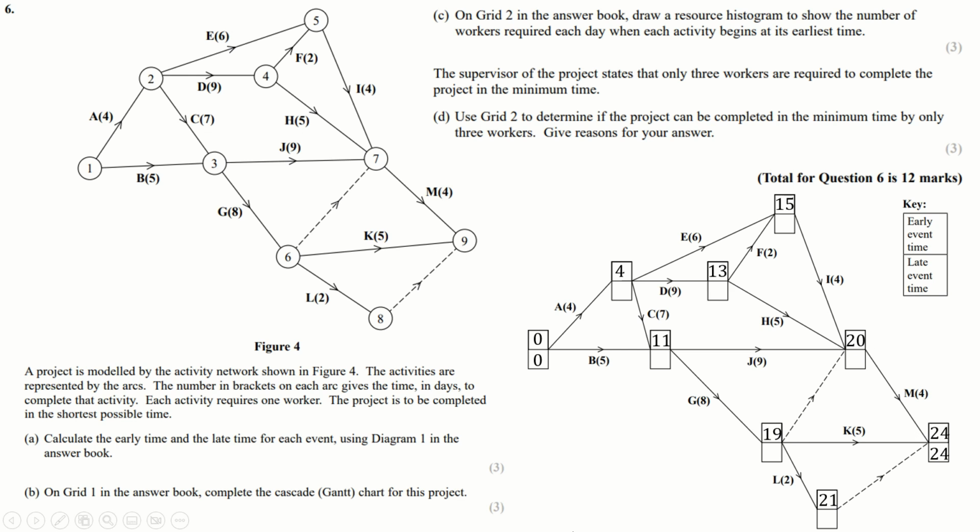Only way back to here is by taking away 4 to get 20. Only way back here is taking away 0, or here we can take away 5 and we'll get 19. Here we could either take away 8 or we could take away 9. So which one is the best thing to do, or gives you the smallest value? Well, actually they both give you 11, I think. But in any case, we'll head up here first, because that one only has one way of getting there.